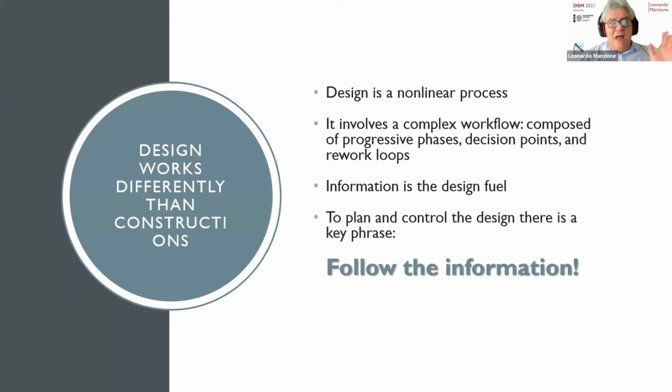Design works differently than construction. Design is a non-linear process. It involves a complex workflow composed of progress phases, decision points, and rework loops. Information is the design field. So, to plan and control the design, I use this like a mantra with my students and my clients, this key phrase: follow the information. If you follow the trace of the information, you manage the project. Do not manage a project based only on the deliverables, because we are not on construction sites. Do not confuse a construction site with design management. It's totally different, okay?